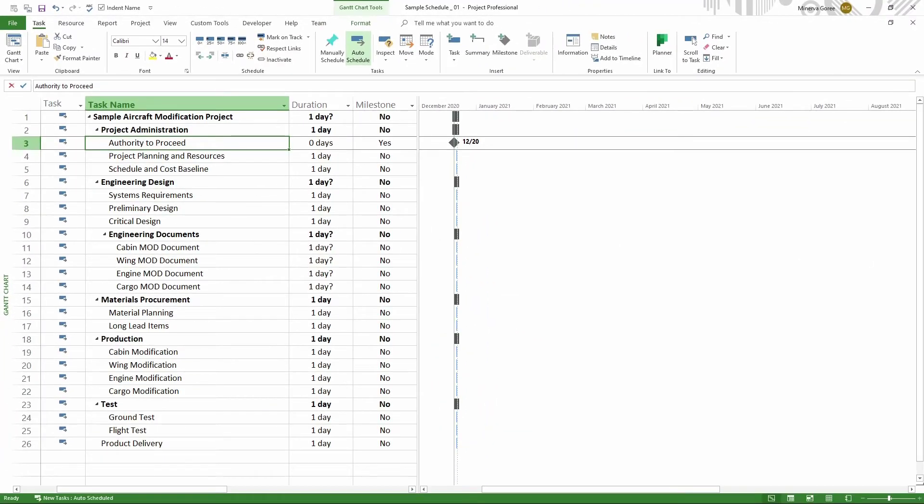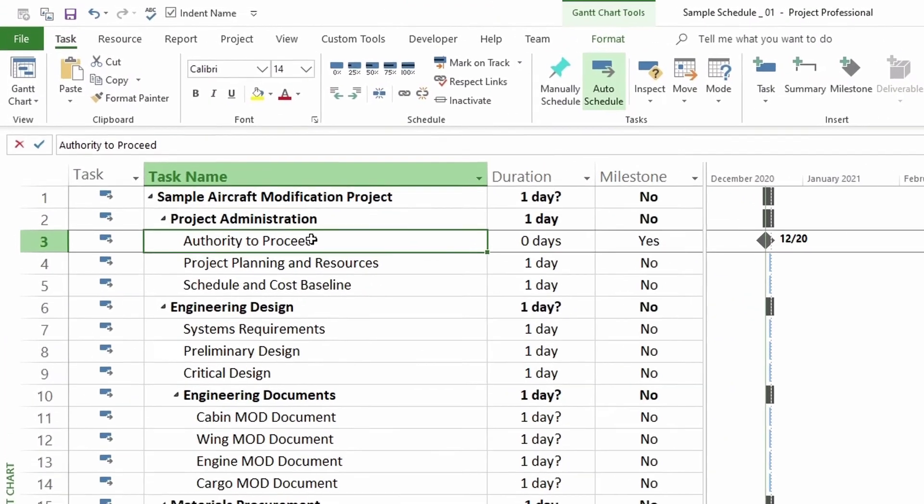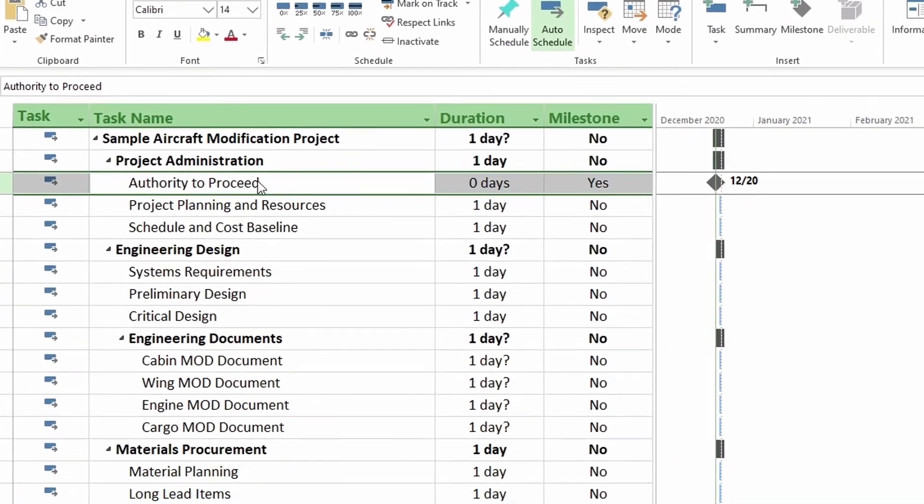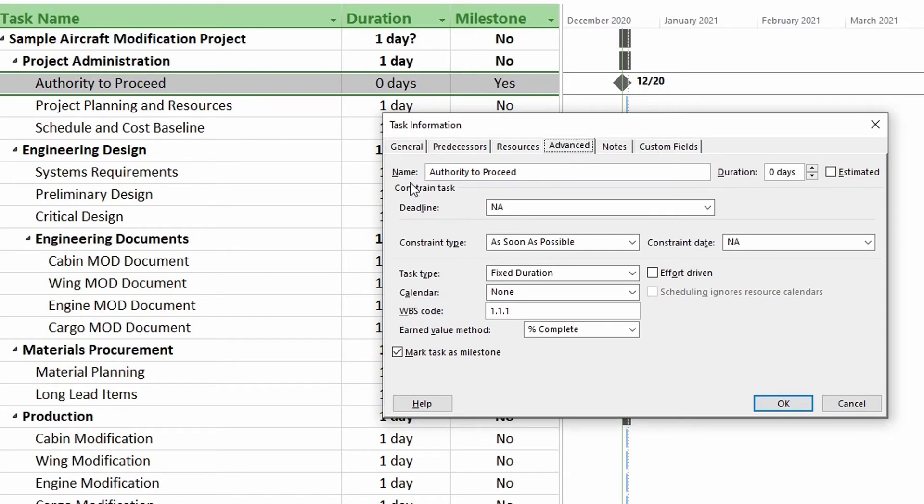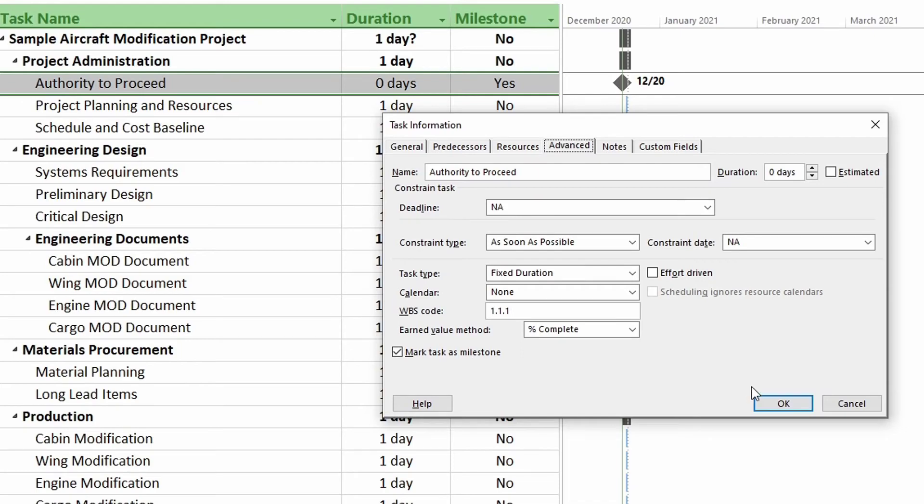Not enough proof. There is another way to know that your task is marked as a milestone. Double click on your task. And you will get the task information pop-up. Here you will see in the advanced tab, click on advanced, that the task is marked as a milestone. So you go down and look here, mark task as milestone. So if you ever are handed a schedule with tasks that have duration and they show up as a milestone in the Gantt chart, then you know where to go to make changes if needed.